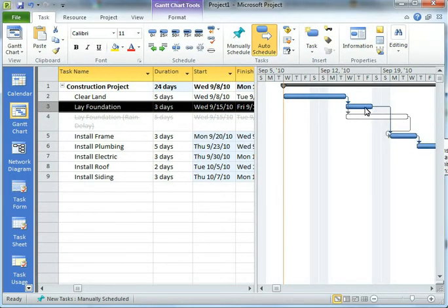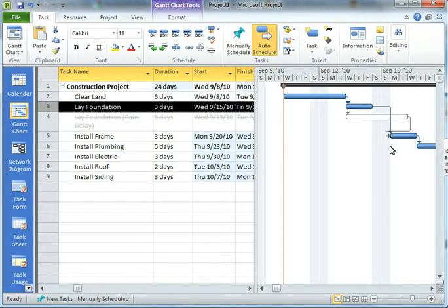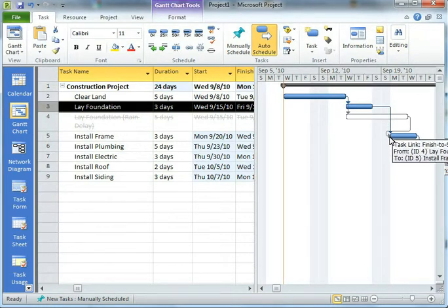Notice how lay a foundation happens. It takes three days and it runs into a Friday, so we've got a weekend in between. But then install frame can start on Monday, no problem. It starts up and our activity goes as expected. That's perfect.